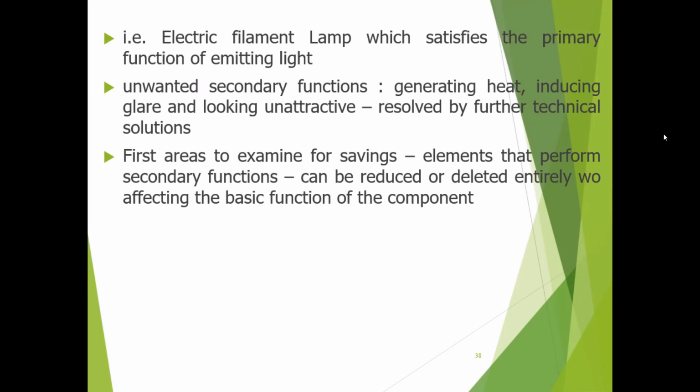First areas to examine for saving are elements that perform secondary functions, which can be reduced or deleted entirely without affecting the basic function of the component. Okay, is that clear as to what we are going to do?